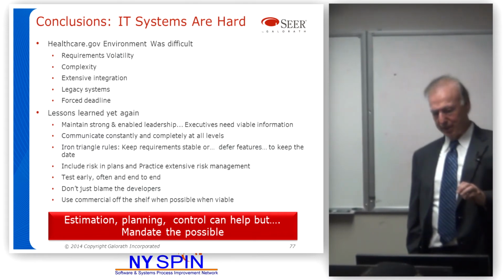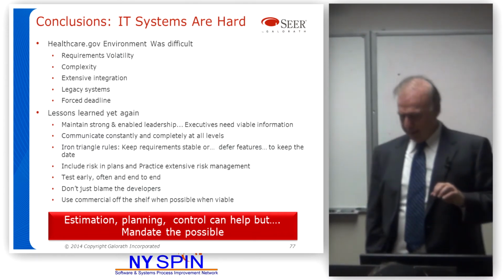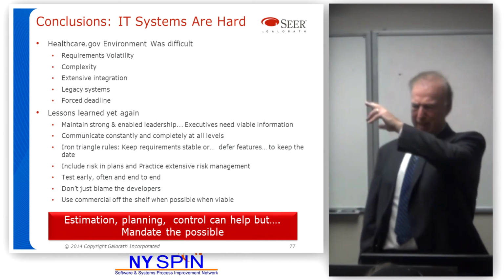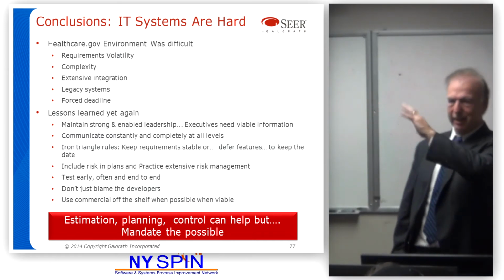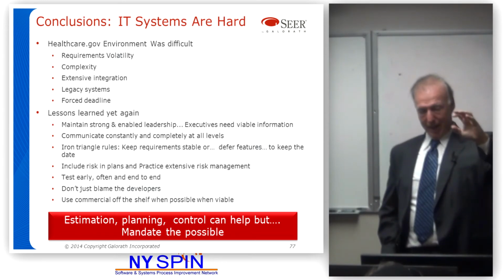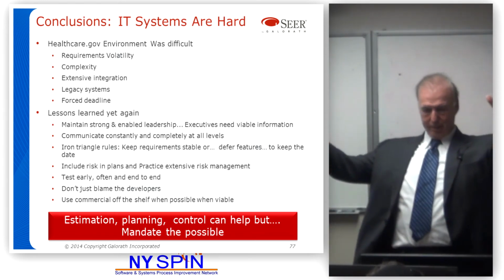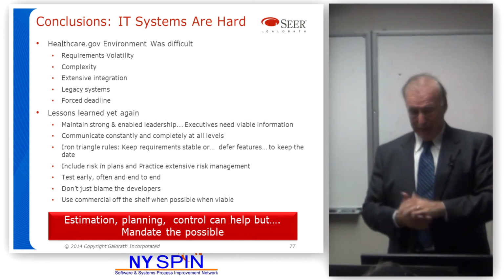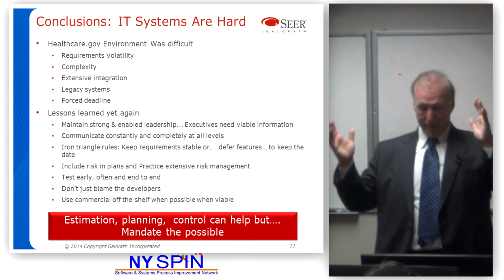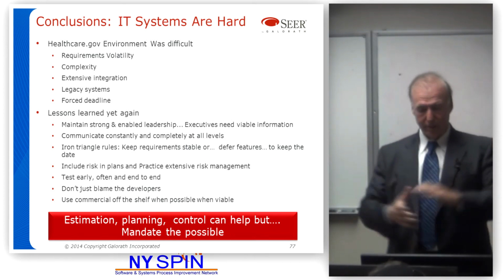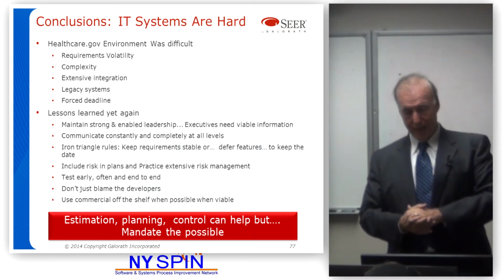Great question. The question essentially was the time spent on the estimate versus the quality of the information. The first step in that 10-step estimation process, which I didn't want to talk about too much, was: what's the scope? Why are you doing this estimate? A one-week estimate should have a bigger risk band on it. Obviously it can't cover all the details. We could do an estimate in an afternoon. We could do an affordability in an afternoon, but there's going to be a lot more risk, more uncertainty, or both. And it might be okay.